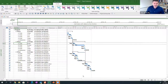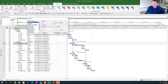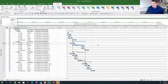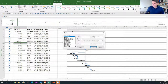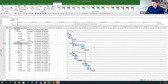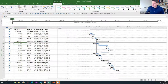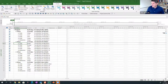Also, the grid lines are missing from the Gantt — they should be there but they're not turned on. Go to Grid Lines, Grid Lines — everyone turns on the first one because that's what's there, but that's the worst one to use; it makes the whole schedule very cluttered with heavy black lines. The correct grid line to use is the second-last one, the little dotted line — it's far more subtle and not intrusive in your project schedule. That's almost the basic substance on how you build a Gantt.